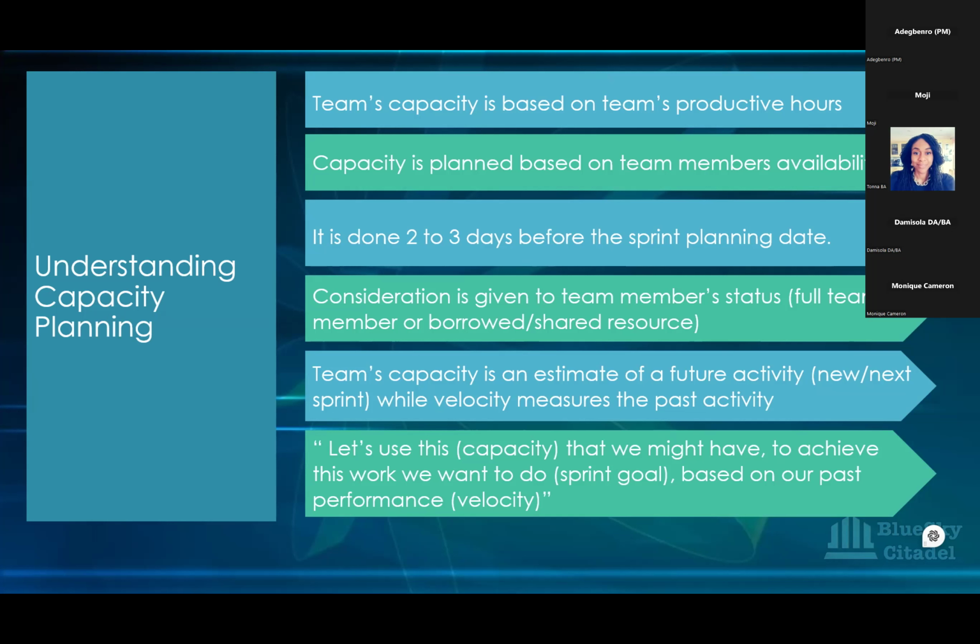Now it's summer, people have gone on holiday with their family, and I have just half capacity. There is no way we're going to be able to do 100 story points. It's not possible, and you negotiate that with the PO. So you would drop it to either 50 or 45.